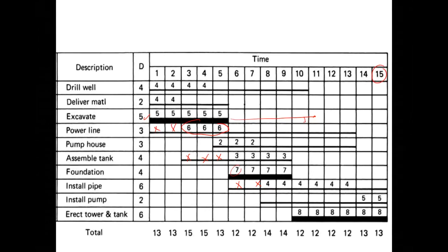So all I'm saying is, yes, you have to explore different optimization opportunities, and this allows you to have the opportunity to explore it with your team. Okay. Here in this problem, we didn't give you that flexibility of diminishing the resources and extending the duration. So it has been specified within this problem that the resources are fixed, and you just use the float wherever available to optimize the allocation.